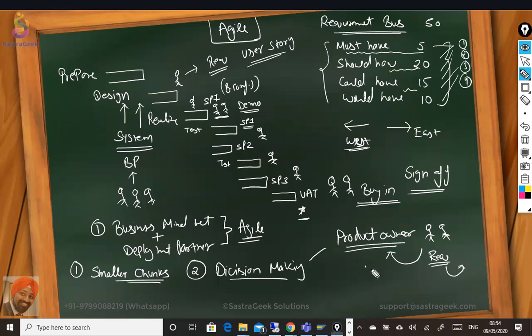So you go ahead with the 4 requirements. One requirement has drastically changed. Either this one requirement you push down to another sprint, or you say that this requirement is very important, so out of the 4, 2 other requirements I am pushing down to other sprints. That kind of thing needs to be done by a product owner and he should be able to make some quick decisions. Many times business is just waiting to make decisions. That's not accepted in the Agile approach.